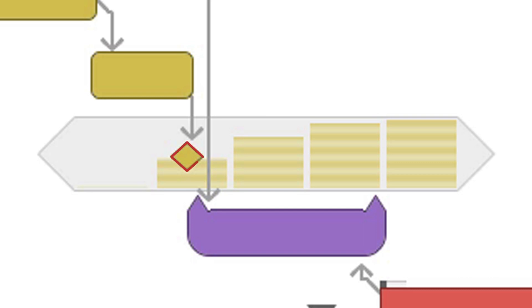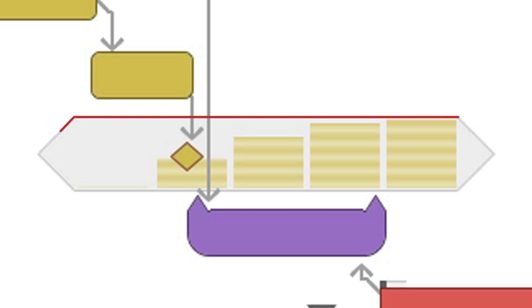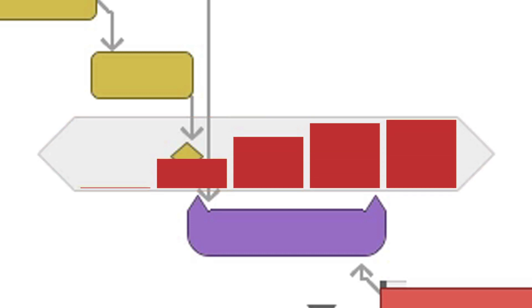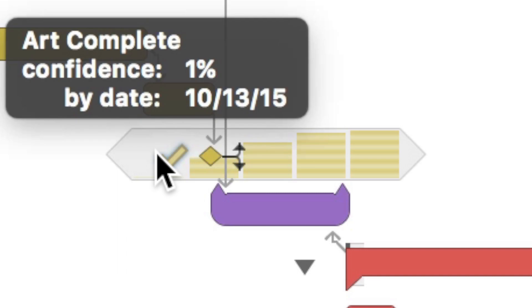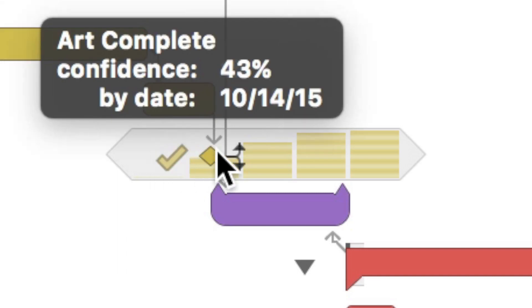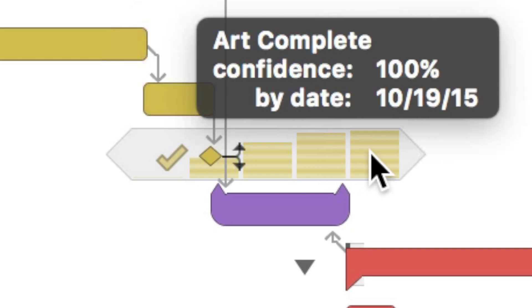The mini-diamond shows your currently planned milestone date. The expanded outline shows the complete range of times when your milestone could complete, from the earliest to the latest, based on the total minimum and maximum effort of all of the tasks it depends on. Inside the outline, there's a bar graph that shows the confidence level for each date — that is, how likely it is that the milestone will complete on that date. Hover over each part of the graph to see detailed stats.